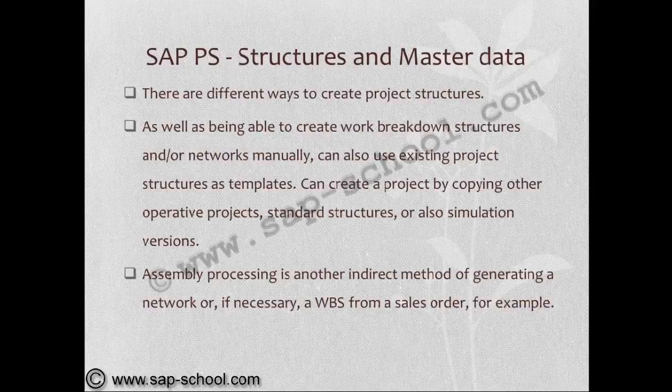If it is a similar nature of project, or a similar category of project, we can use them as templates to create a new project structure. You can create a project by copying other operative projects. Standard structures are also simulation versions. So these are all different ways to create project structures.